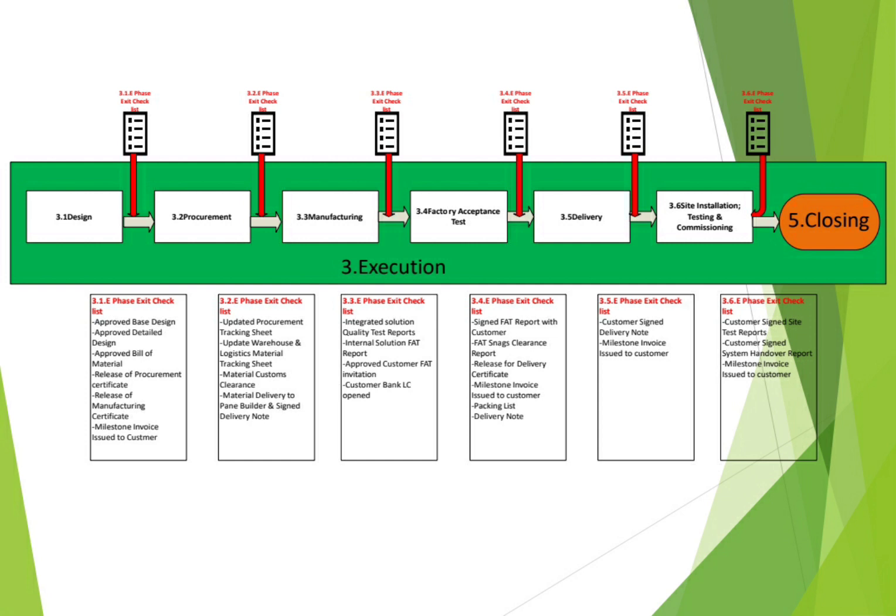For the technical part of this quotation, the technical lead reviews. For the commercial part of this request for quotation, the project manager can review. And also the procurement team need to have your basis of estimation for this project or your budget for this project, where already these elements are identified in your budget.